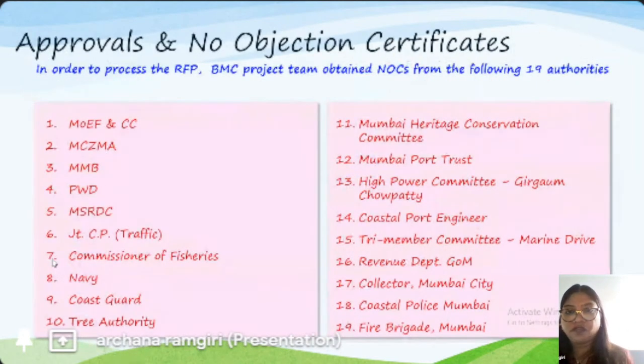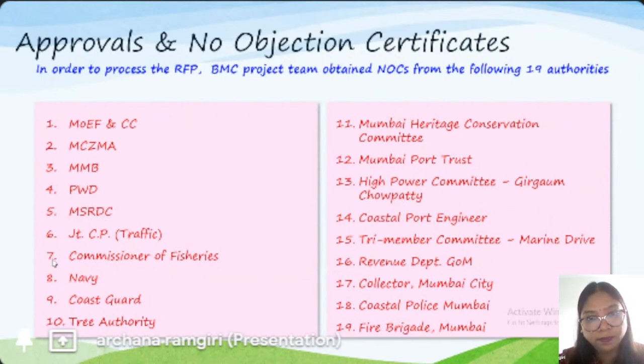As this project is very prestigious and unique, a number of authorities and stakeholders are involved, and we have to take an NOC from these authorities. For example, MoEF&CC and MCZMA for CRZ purposes. Then MMB, being coastal, PWD, MSRDC, and the Commissioner of Fisheries. As we are in an intertidal zone, there may be an impact on fisheries, so we have taken an NOC from the Commissioner of Fisheries, and from the Navy and Coast Guard from a security point of view.